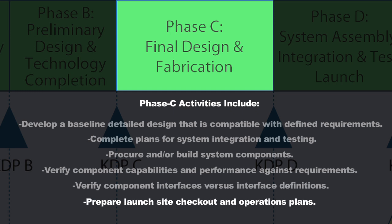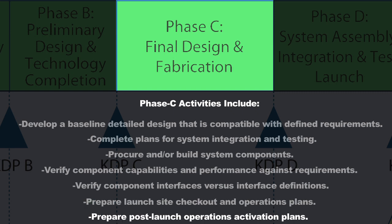You're preparing the launch site checkout and operations plan and the post-launch operations and activation plan. So even though you may still be far away from launching, you're starting to make sure that as the system matures, you've got a clear path on how you're going to actually launch and operate the system — and that's being defined at this early stage in Phase C.